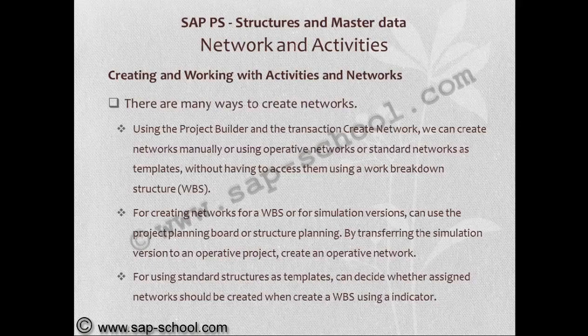For creating networks for a WBS or for simulation versions, you can use the project planning board or structure planning. By transferring the simulation version to an operative project, you create an operative network. For using standard structures as templates, you can decide whether assigned networks should be created when you create the WBS using an indicator.